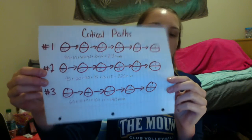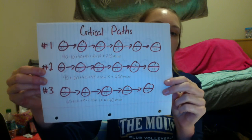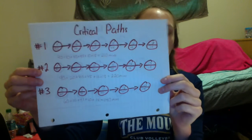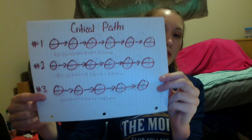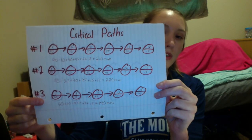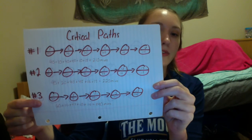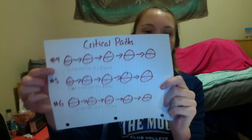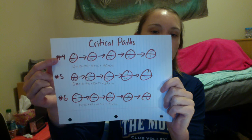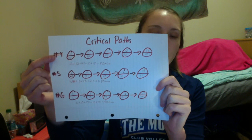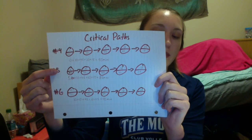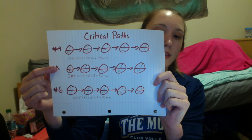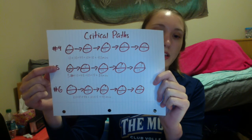For path number 3, we have activities 2, 8, 11, 12, and 13. Their durations add up to 220 minutes. For path number 4, we have activities 3, 9, 11, 12, and 13. Their durations add up to 90 minutes. For path number 5, we have activities 4, 9, 11, 12, and 13. Their durations add up to 85 minutes. For path number 6, we have activities 5, 9, 11, 12, and 13. Their durations add up to 90 minutes.